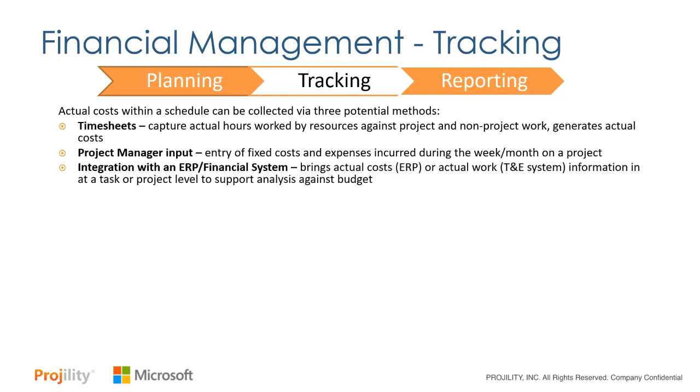The third method, as I mentioned before, is integration. And this is one of the popular reasons why a lot of people integrate with another system and their project management system, because you often have actual costs somewhere else. What we want to do is we bring our actual costs from our time and expense or our financial system into Project at a task level or at a project level. And to do it at a task level, you have to capture actuals at a task level, means your timesheet in your ERP system needs to marry up to the schedule detail, which often isn't the case.